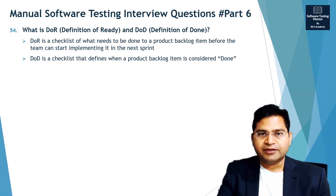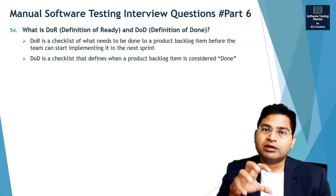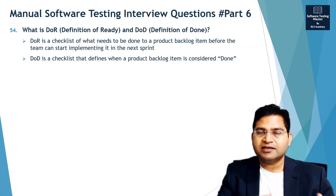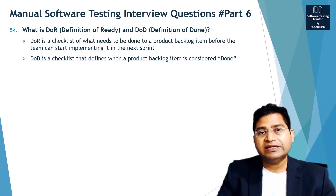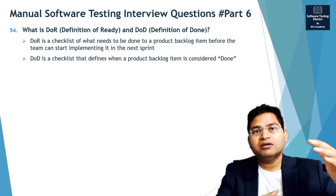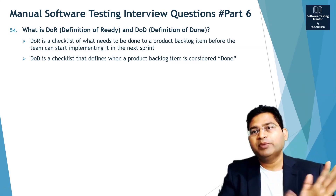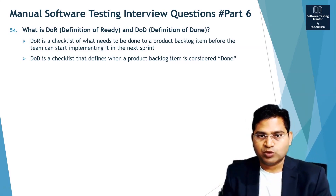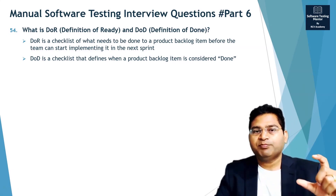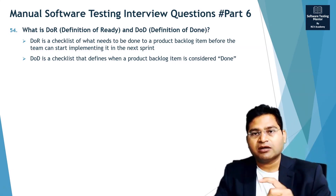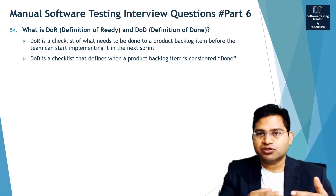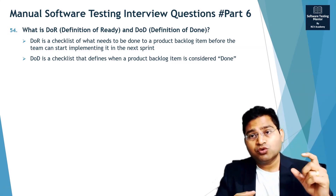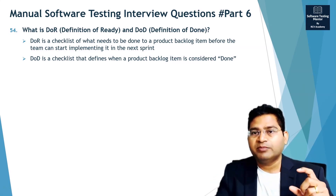Definition of Ready is more applicable to the product backlog — the requirements or stories in the product backlog — and defines what state those product backlog items should be in so the team can start implementing them. In Agile, the product backlog holds high-level requirements, and a small chunk of user stories — maybe four or five — is picked up for a sprint backlog. Definition of Ready defines the state those user stories should be in so the team can straight away start building.